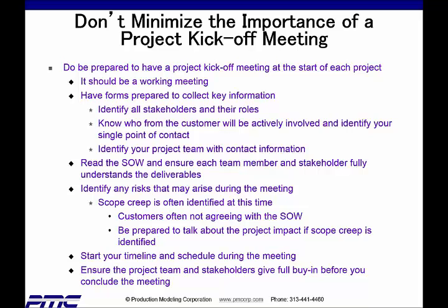Some of the information you want to ensure you collect at this meeting will be all the stakeholders, all their roles, all their information, their emails, their phone numbers, everything you can find out about them. You want to keep that on one single individual form. You want to know who from the customer will be actively involved and even who will not be actively involved but will be interested in the program itself. And also identify your single point of contact with that customer.